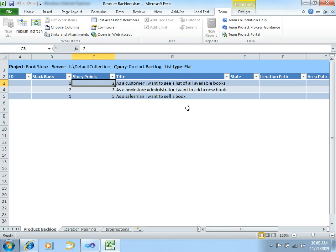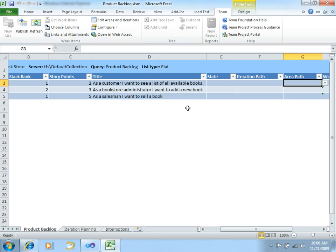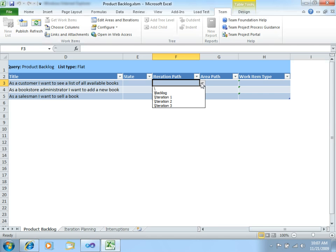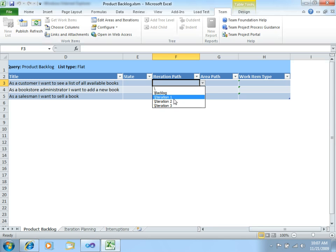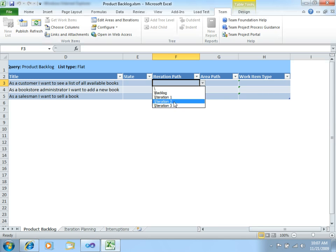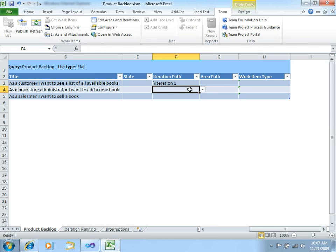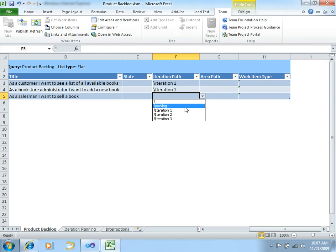So, now that we have this, we should state in which iteration or which sprint we want to develop this User Story. So, if we open this iteration path cell, we can see that we already have stated the three iterations for this application. This is the default, you can also add more iterations from the Team Explorer. So, let's say we will develop all these requirements in iteration one.